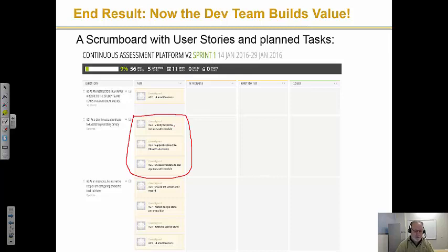But very often you will actually take tasks and say, how long is it going to take me to modify HB to include the auth model? Oh, that's only going to take me an hour. How long is it going to take me to program a redirect in? Oh, that might take me 4 hours, right? And then you get a sense of your resource requirements for the particular sprint. So that kind of tracking can be done.